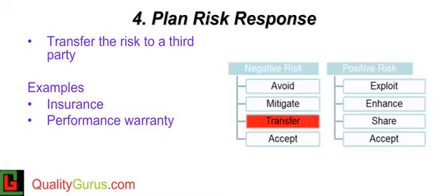The risk transfer strategy aims to pass ownership for a particular risk to a third party. It is also important to remember that risk transfer almost always involves payment of a risk premium. A cost and benefit analysis might be done to ensure that the cost of transferring risk is justified.